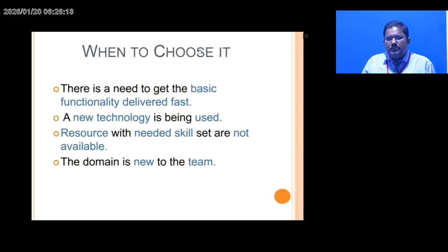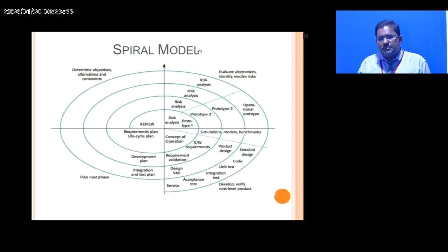When to choose it? When there is a need to get the basic functionality delivered fast, a new technology is being used, resources with the needed skill set are not available, or the domain is new to the team. At that time you can choose this model.